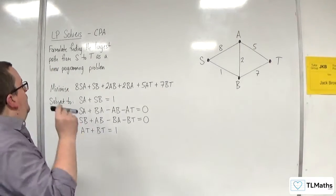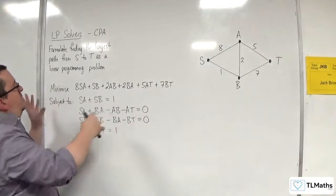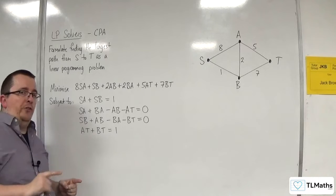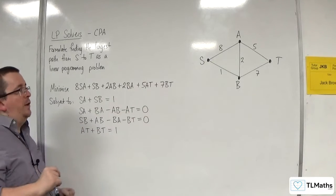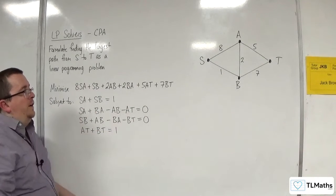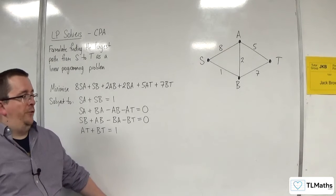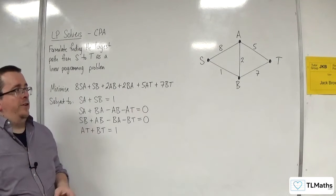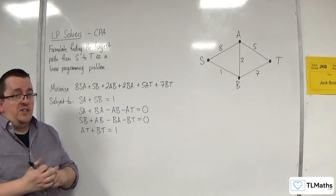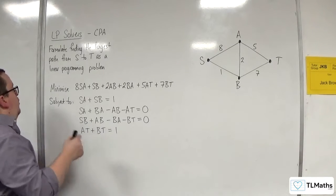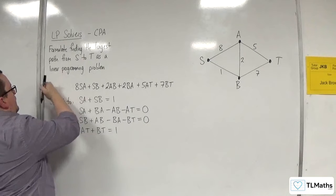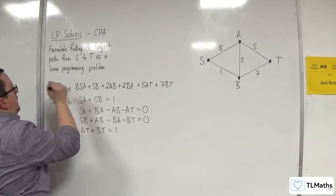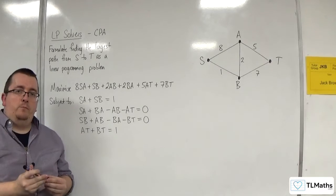What I've got here is my answer to when we did this same problem but to find the shortest path. We worked with the same network a few videos ago, and this was my LP solver that found the shortest path. Now, if I want to find the longest path, your gut instinct might be: I'll just change minimise to maximise. Done. Surely.